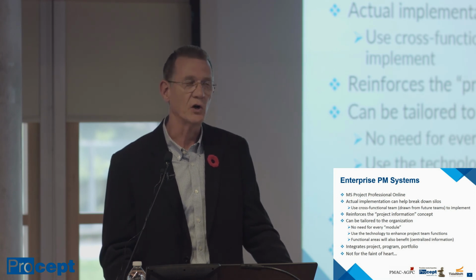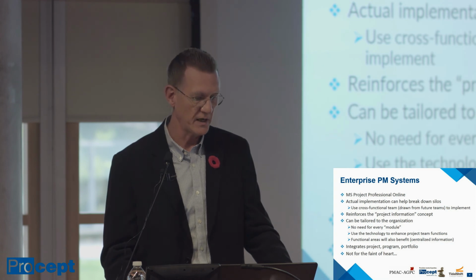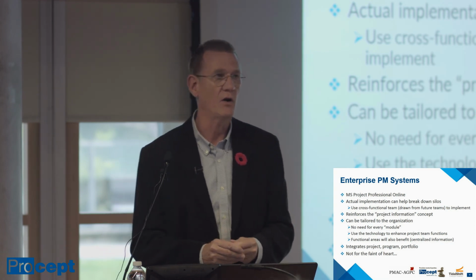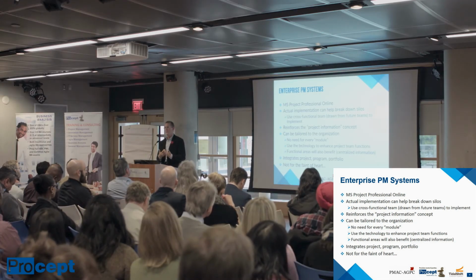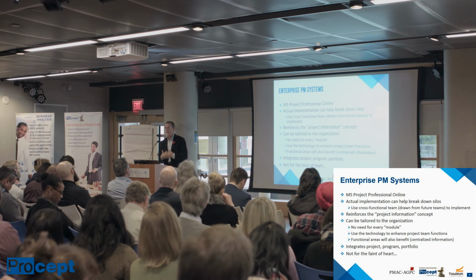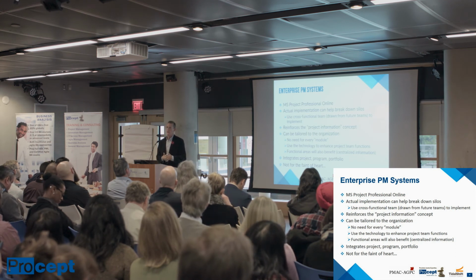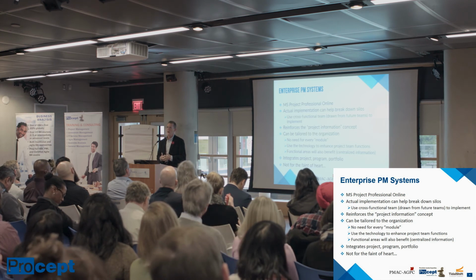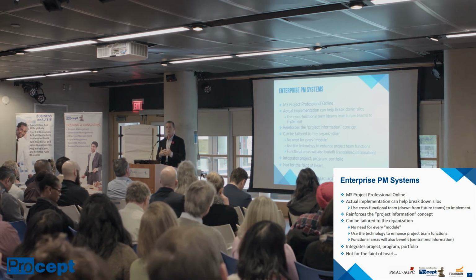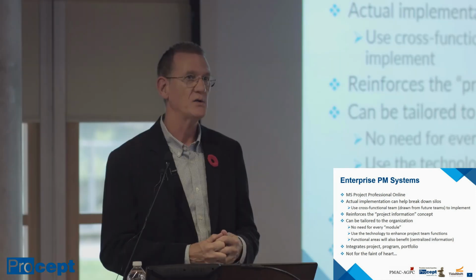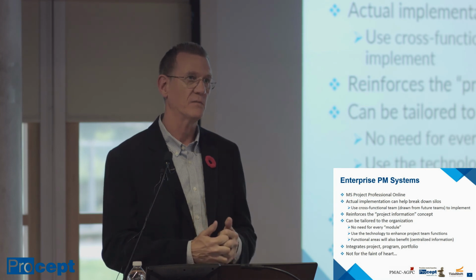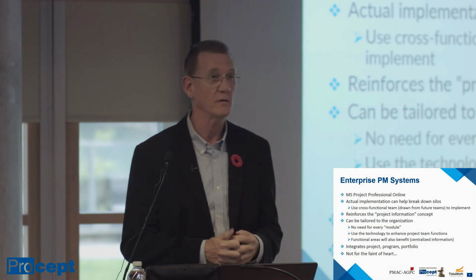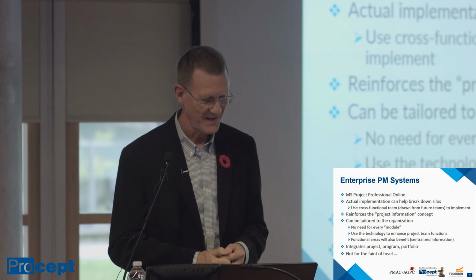But some of the things that we learned were invaluable. The first thing is that the actual implementation, not once it's up and running, but the process of implementing a project management enterprise system, actually will help you to break down the silos that exist in that organization. Well, why is that? Well, because guess what? You have to get all the functions together, and they have to work together on this new project. And you have to decide how you're going to manage your projects in the system. And that requires that people talk to each other who would not normally talk to each other.